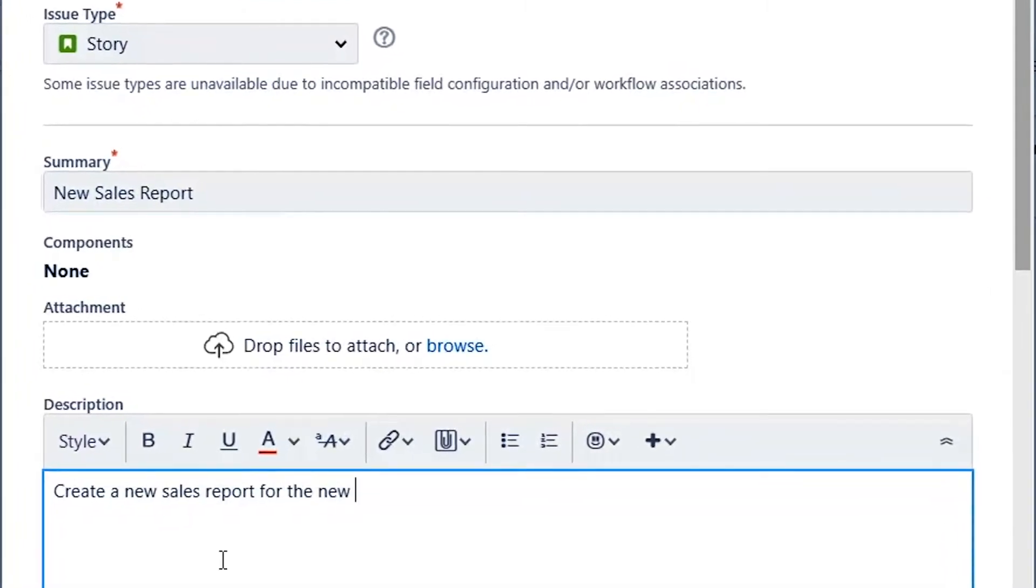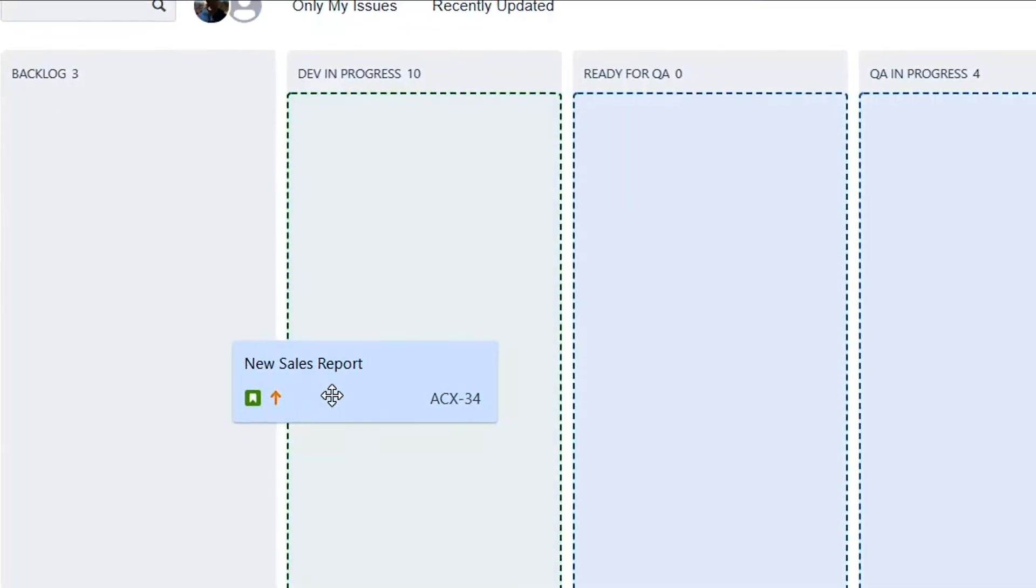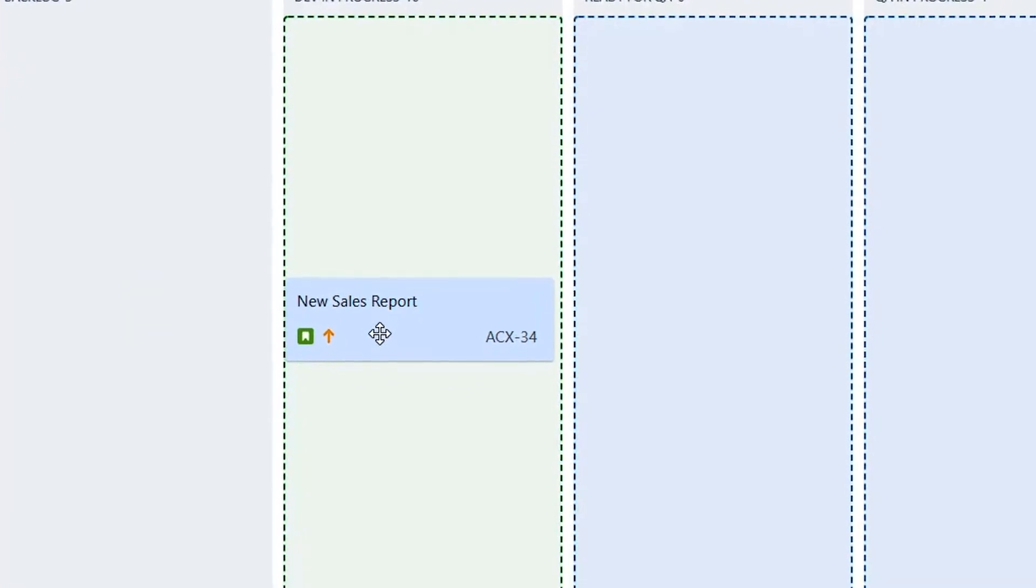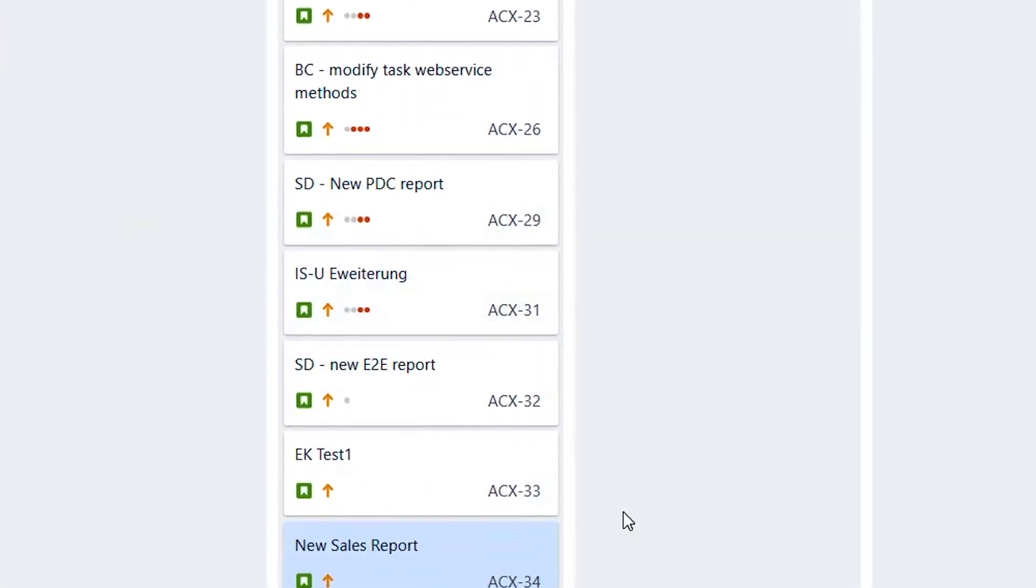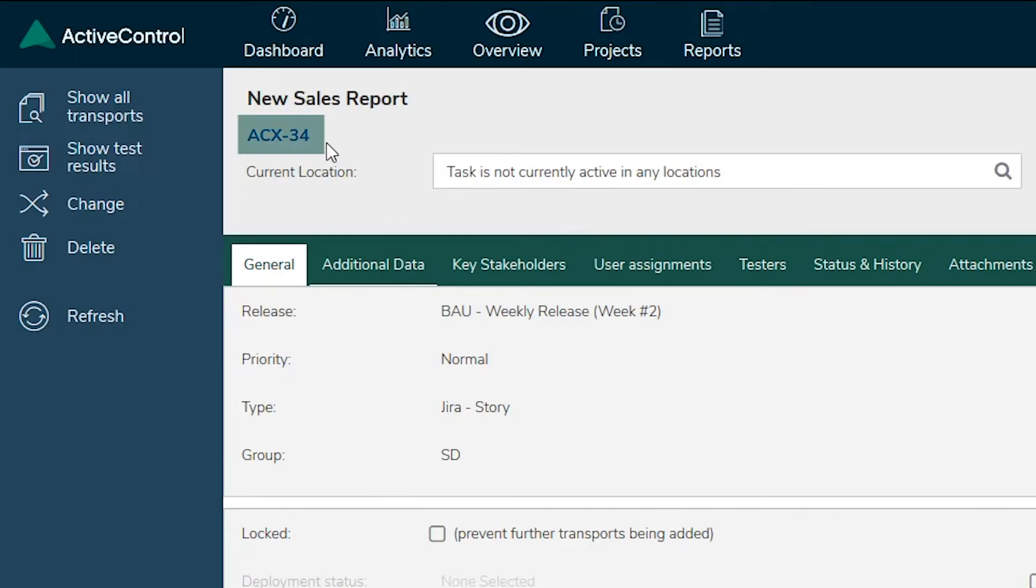The stories are added to the next sprint. ActiveControl's integration with JIRA automatically creates a business task with the JIRA user story number as a reference.